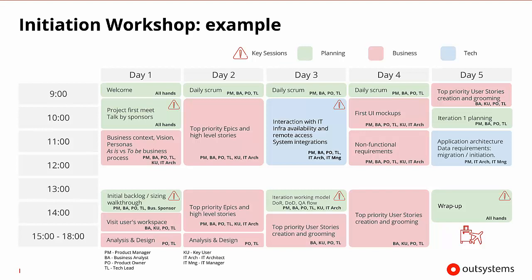During initiation, we'll be drilling down more on different iterations and trying to rediscover and compare what we know now versus the initial sizing. Progress will have to be reported, so there will be daily scrums, and that will happen first thing on each of the days between days 2, 3, and 4.